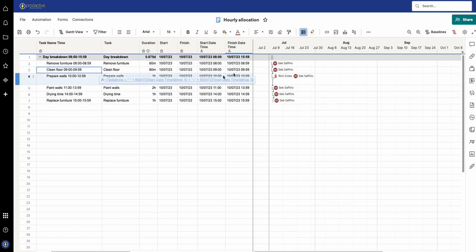This way if you're going to have this in resource management or a resource plan or a report for someone's task list, then this can tell them exactly the time that they are working from and to on that particular task.